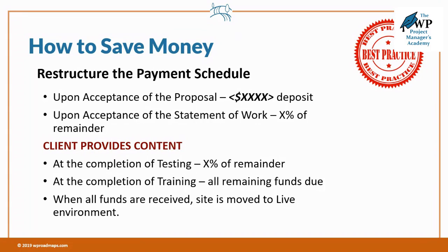Now, some folks, some agencies will position that as a completely separate project with a deliverable at the end of here's the website specification. And you can do it that way. There's no problem with that. The most important thing is that you get paid for everything you do. A lot of people will do this deep dive discovery, put all of that detail in the proposal, and then the client takes and gives it to somebody else who will do it for cheaper. This is why you don't include all of the detail in the proposal.